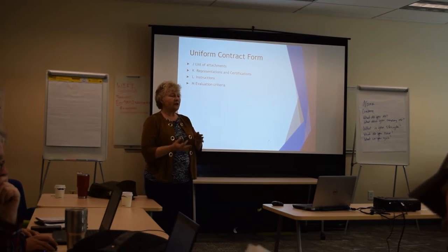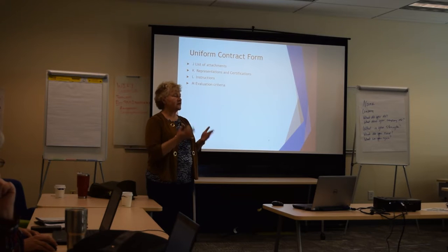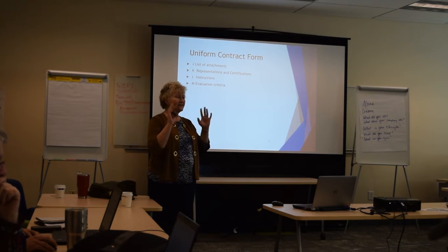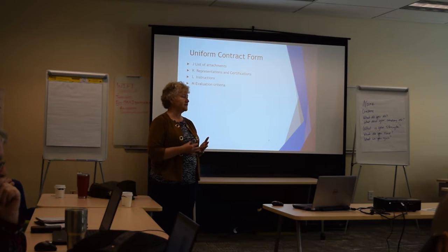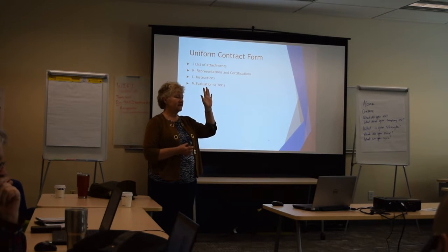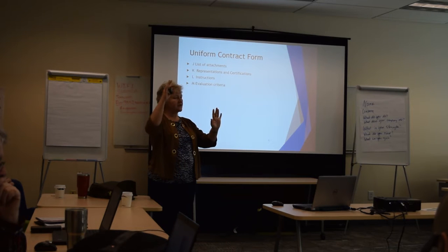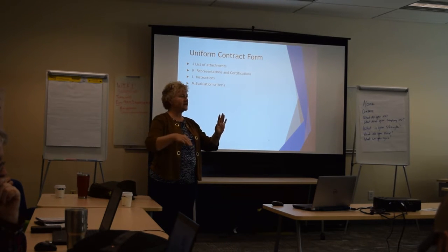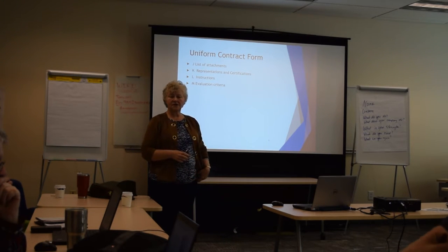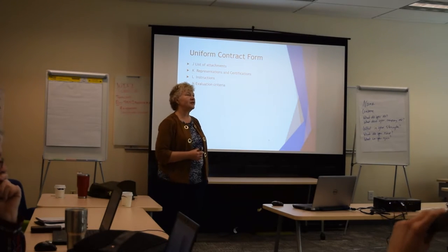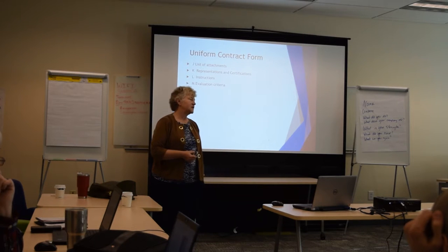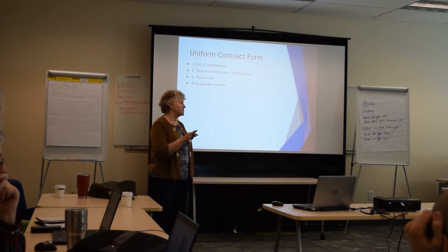So the requirement for the government is that they have to upload everything to FedBizOps. And everything that you see on that home screen for that solicitation number is what you have to consider. So what will happen is the government will post the main solicitation and then any amendments or any contract forms that you need to complete. So they'll actually provide you templates for various things. Sometimes they have a read me first document so that they sort of guide you through how they've structured things.